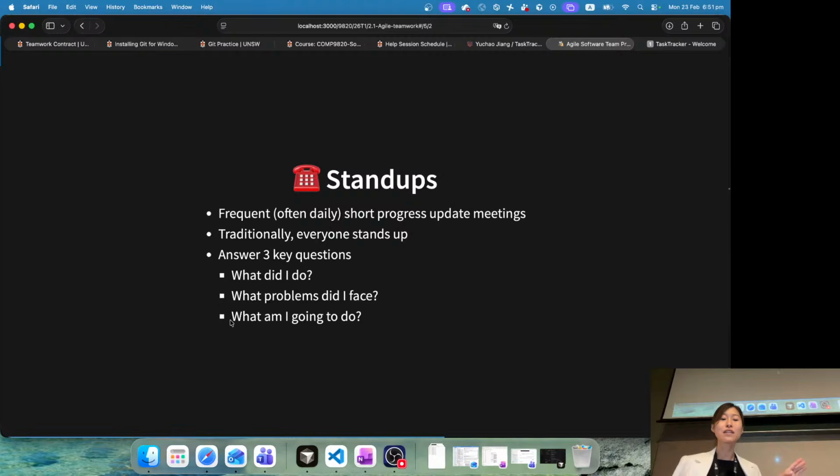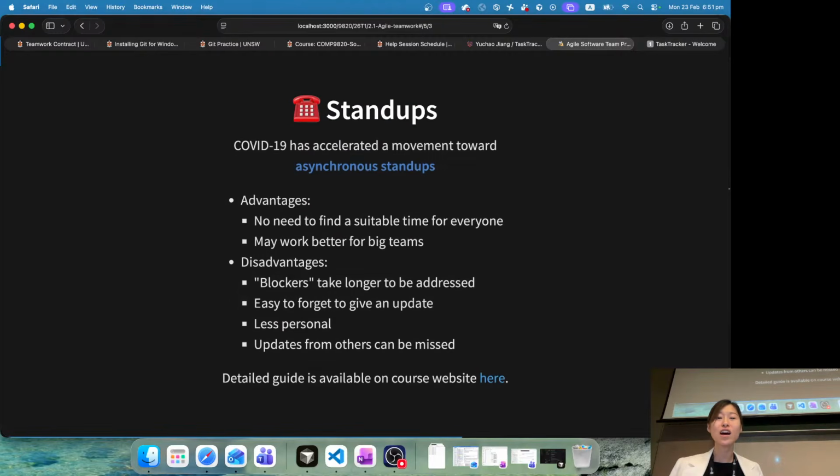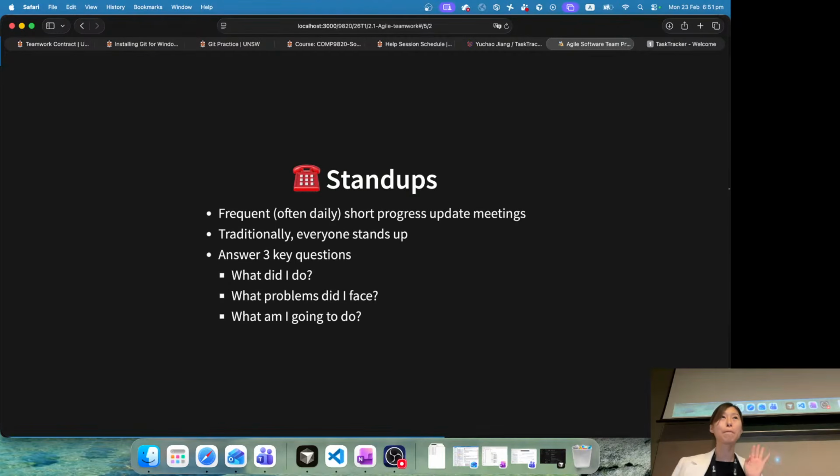Yep, and also the last question, what am I going to do? Making sure that other people on our team know what they are going to do tomorrow, so that they can plan based on your plan. And you do not need to spend too long on these stand-ups. Maximum 15 minutes per day. I think 2 or 3 minutes per day will be quite enough. You just need to reflect a little bit on how everything's going.